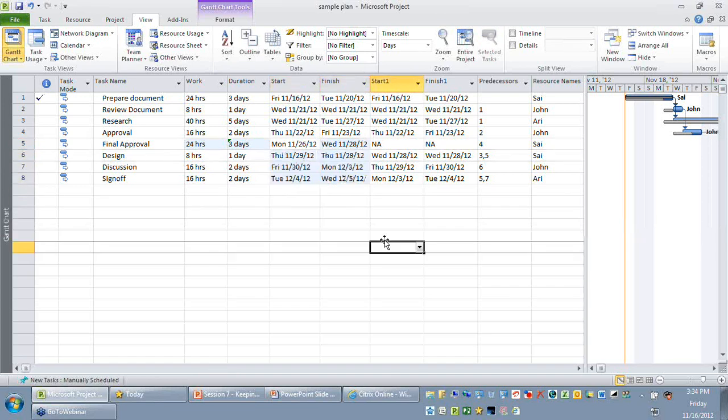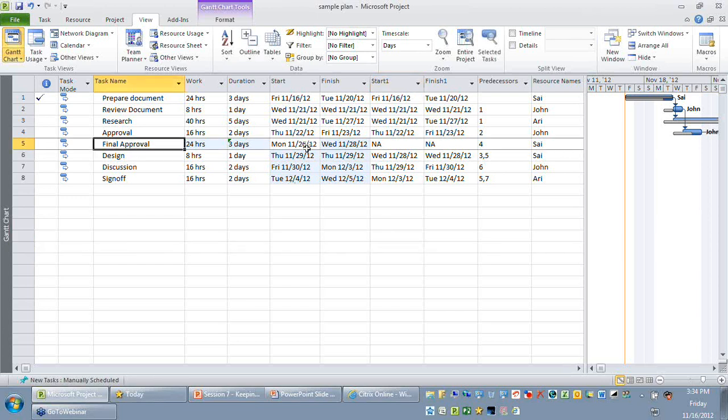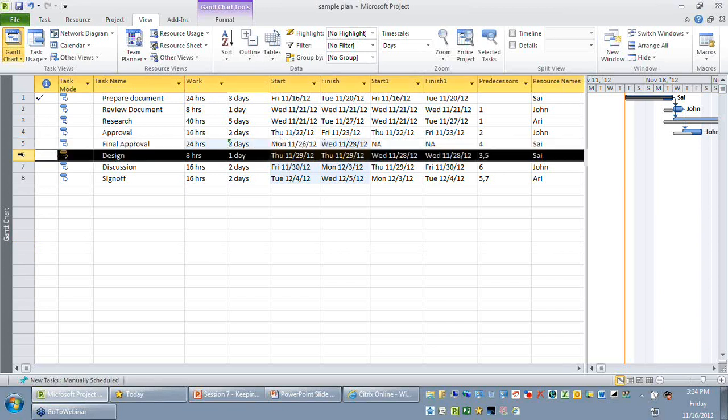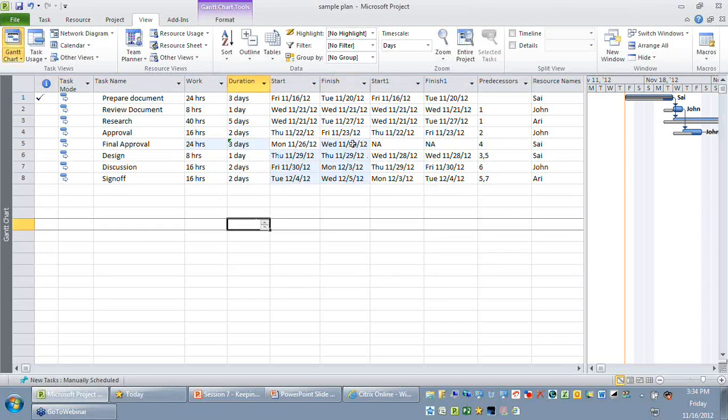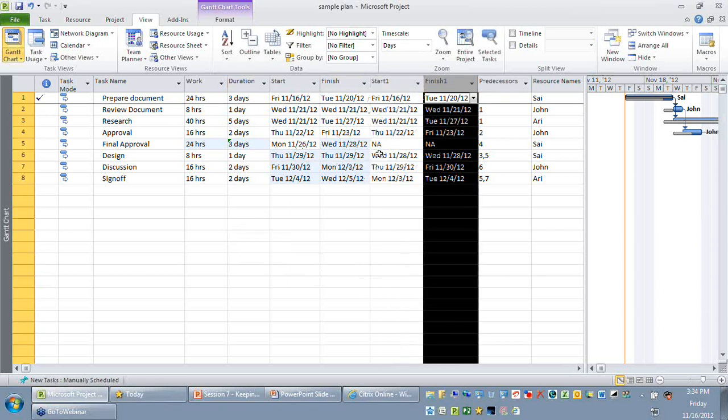So as you have already seen, doing the baselining for the entire project for an approved change request will not work. So you need to incrementally update your baselining. As you can see now, the new set of activities have impacted row number 4, 5, 6, and 7. So it's quite easy to visualize here, without looking at start and finish, just by the change highlighting color, that these activities got impacted. But a change request will not be so simple like this.